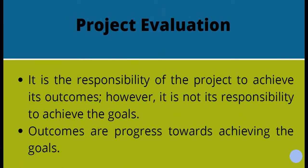As we move into project evaluation, an important consideration is thinking through the logical framework of activities to outputs to outcomes to goals. At the project level, our responsibility is up to the outcome level, not to the goal level. We want to achieve the outcomes to work towards the goals, but our focus and accountability is for the outcomes of the project.